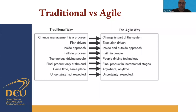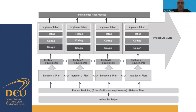Here you see the project lifecycle with several types of implementation, with an incremental final product at the end. Iterations are based on the requirements and are usually guided by an iteration plan. You plan how many iterations you need upfront, and these come from the product backlog — a list of known requirements — along with a release plan.